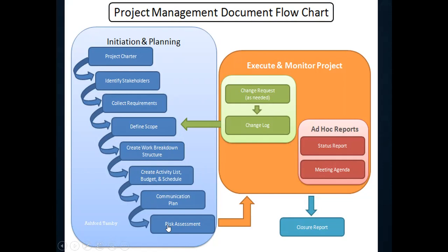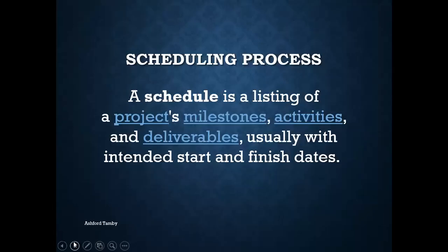So on the template that I developed for this company, as it went through each section, each manager had to sign off on the risk assessment if it was done, the communication of it, the change in the budget, change in the schedule, things like that. And then you go along, and this is how change in one company is done, right? Other companies would have different change request models.